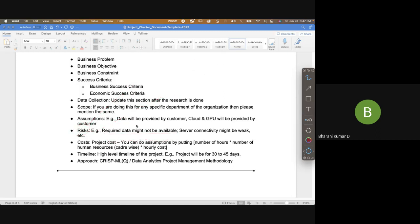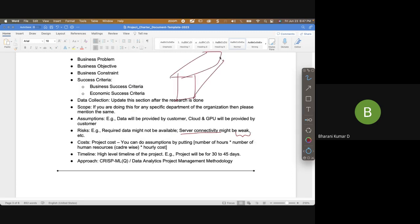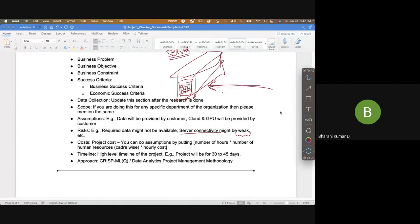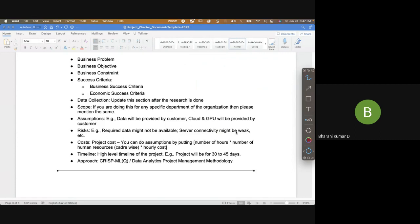Some examples of risks: required data might not be available — if it's not available the project will fail because garbage in, garbage out. If you're dealing with inappropriate data the results will be incorrect. Server connectivity might be weak — say you're doing a project in an underdeveloped country and trying to connect to the server from your location; you may not be able to connect.